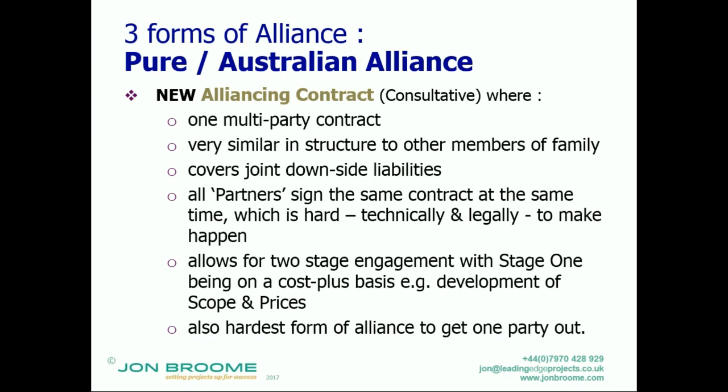and if they didn't work, everybody would be going, well, which contract did we sign at the point of entering into the contract? Having said that, it does allow for two-stage engagement, where stage one is on a cost-plus basis. So consultants, you work as consultants to get to a stage where everybody's happy, and then stage two is the implementation, and that's where pain and gain is.